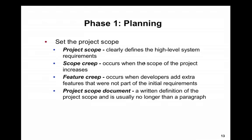In terms of planning, you also set the scope of the project. You have this thing called scope creep that happens in IT projects all the time. You say we're going to upgrade the network, then the email system, then this, then that — why don't we have wireless? All of a sudden it's completely out of control, like the project never ends. A lot of IT projects go on forever because the scope keeps creeping, and the project is essentially starting over every month for something new. Feature creep is also part of the planning vocabulary — it occurs when developers add extra features not part of the original requirements.